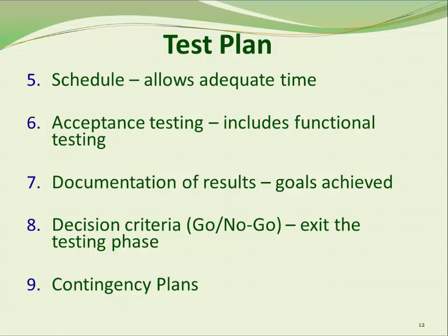Most importantly, specific test results should be defined explaining how they will be met before the state may exit the testing phase. These are known as go, no-go decision points.